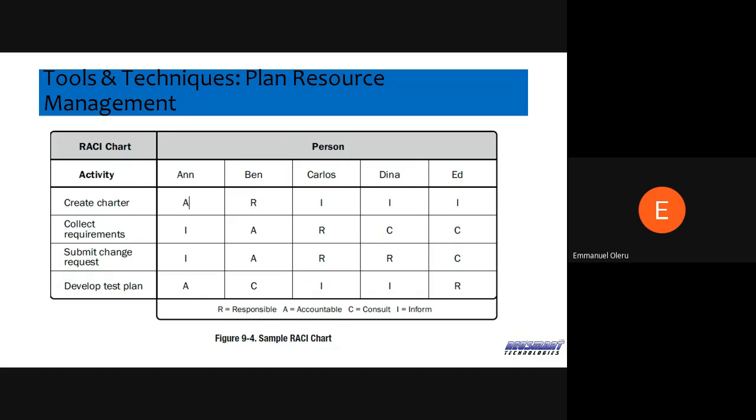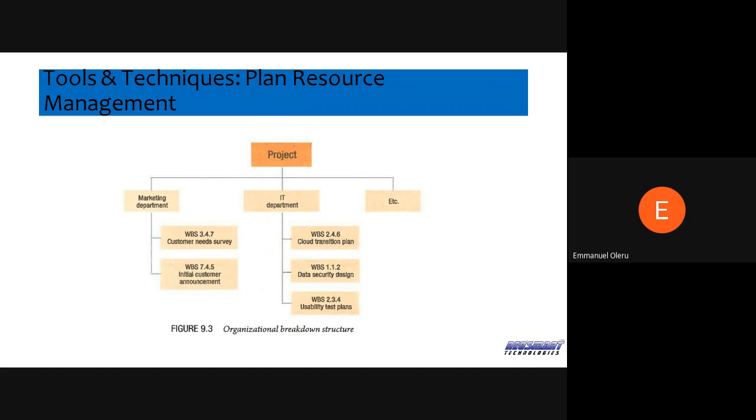To submit a change request, you keep Anne informed as well, and Ben is still accountable, and Carlos is still responsible, but this time he's doing the job alongside Dina, so both of them are responsible, and they are consulting Ed to get it done. To develop the test plan, Anne is accountable, Ben is to be consulted, Carlos and Dina are to be kept informed, and Ed is the one actually doing the job. So this is a simple RACI chart that can help you plan your resources as you go.